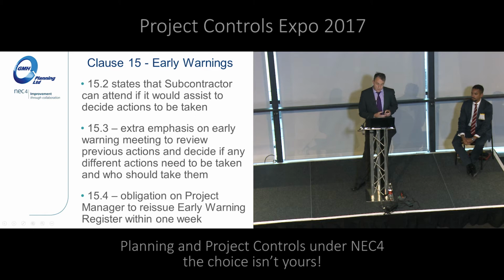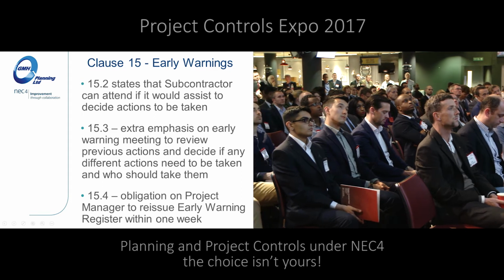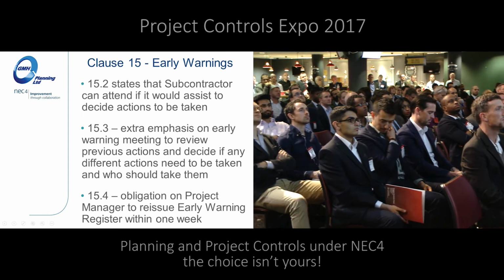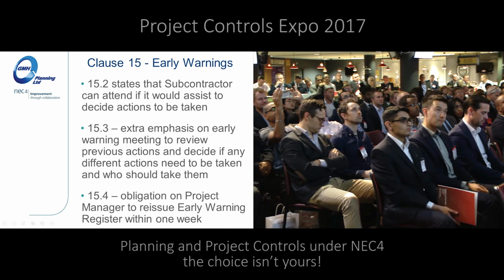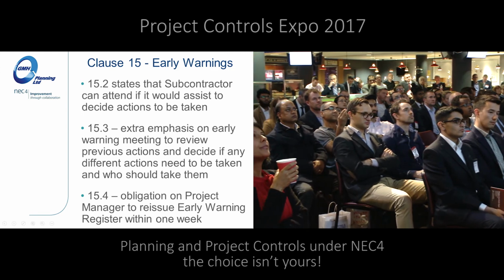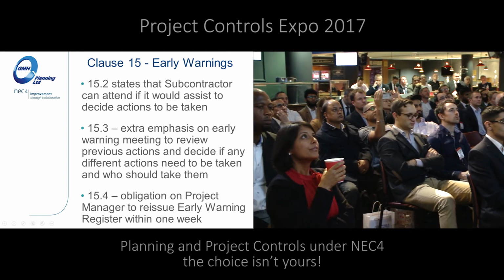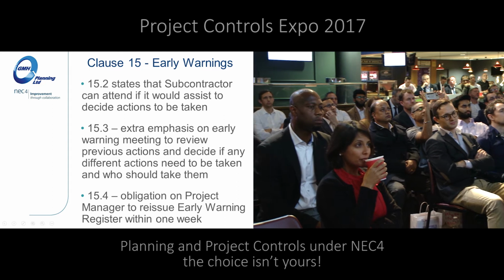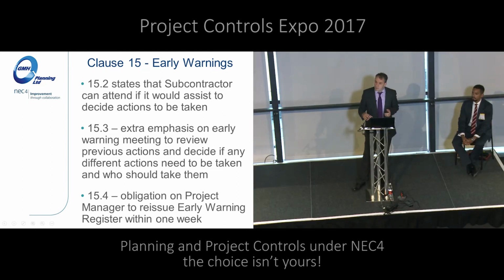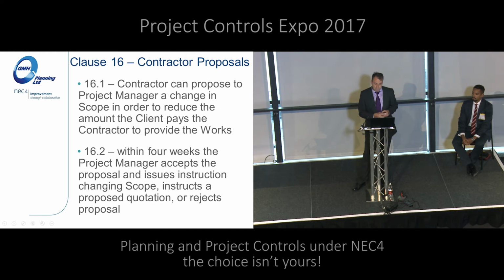And 15.3 talks about extra emphasis on the early warning meeting to review previous actions and decide if any different actions need to be taken and who should take them. Again, you'd like to think that would happen, but it's now in print that that has to occur. And there's an obligation on the project manager to reissue the early warning register within 1 week. Previously, I think in practice, it was 5 minutes before the next meeting when they'd issue that. So now they've got to do it within that timescale.